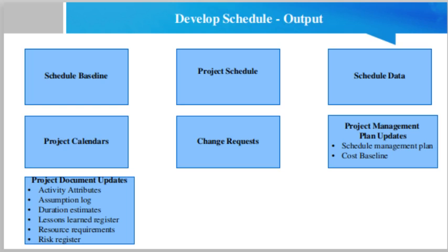Cost baseline, which includes changes to the cost baselines, are incorporated in response to approved changes in scope, resources, or cost estimates. In some cases, cost variances can be so severe that a revised cost baseline is needed to provide a realistic basis for performance measurement.